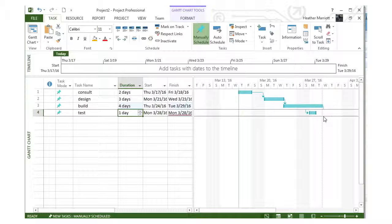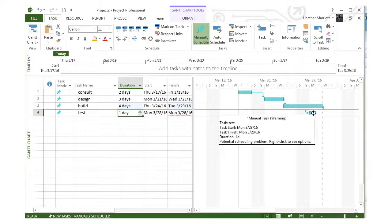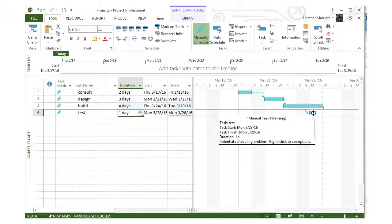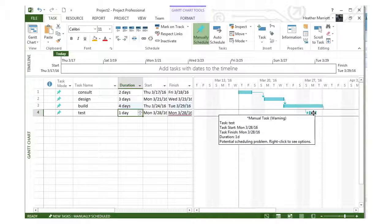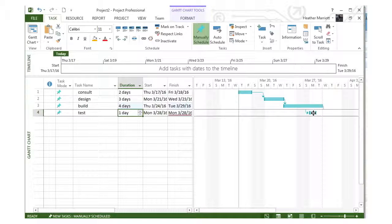The bar on the Gantt chart looks unusual, and hovering over it shows a warning: 'This is a manual task. There's a potential scheduling problem.' Because we chose manual scheduling, it won't update the start date of the testing phase, but since we set a finish-to-start relationship between build and test, something's potentially wrong.